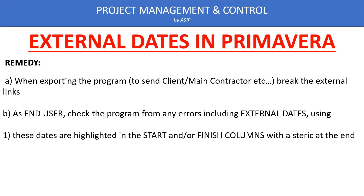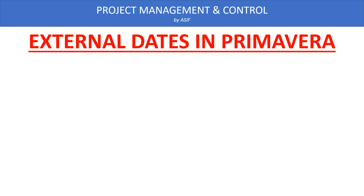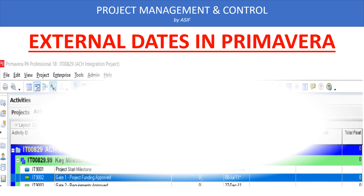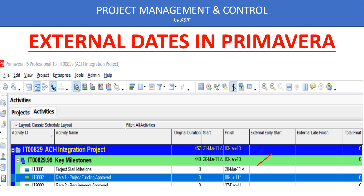As you can see here, I show the start and finish date and one activity is marked with static. This static indicator shows that the activity is linked or assigned a constraint. We have to go to that activity and check what type of constraint it is. If it is an external date, it will not be shown here — it will only be shown in the project schedule log.